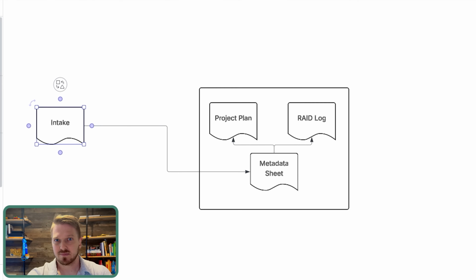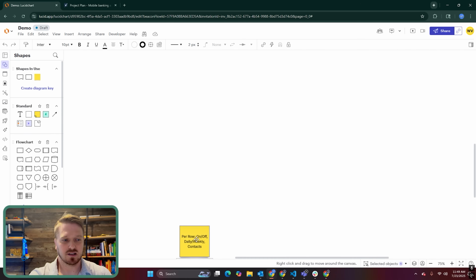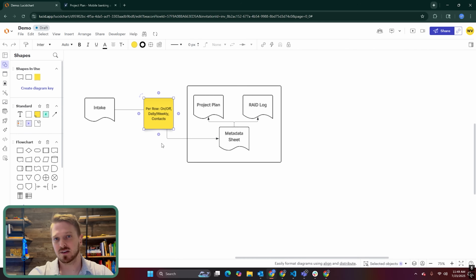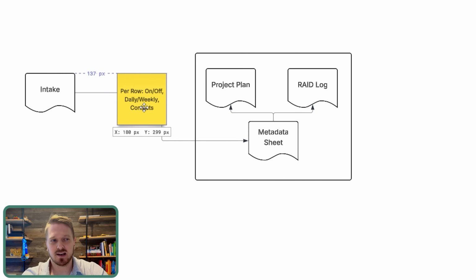Now, when you're setting up a portfolio, I recommend using the intake sheet to handle a few of the important options with notifications. Let's say you have a project that could go on hold. And when that project goes on hold, you don't want notifications to go off, even if someone's editing in them. I recommend creating a few fields in your intake that can manage that process. So one is the ability to turn off and on the notifications. That means that from the intake for that specific project, you could switch it off. And you can do that by sending the data to the metadata sheet, and then every single project sheet is looking at the metadata to know, should I have automations on or off?